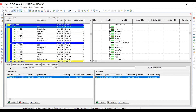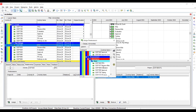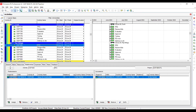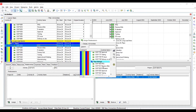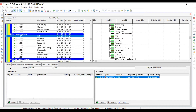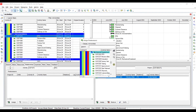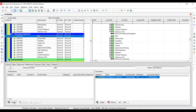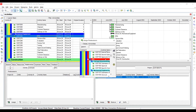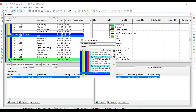Pipe fittings need to depend on detail engineering design for mechanical engineering — specifically mechanical piping. There are two kinds: mechanical engineering and mechanical equipment. Pipes long lead items are also assigned to detail engineering design for mechanical engineering piping. Instrumentation also depends on mechanical engineering detail engineering design. Mechanical equipment RFQ depends on detail engineering design for mechanical equipment. That is the interlinking complete.